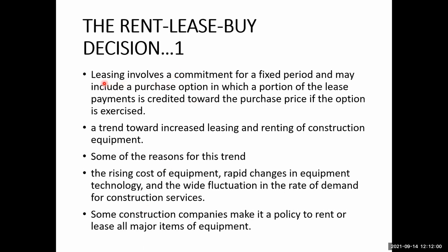Another term which is used is leasing. Leasing is also renting, but the general difference between leasing and renting is that in renting there is normally no fixed period commitment. That means you rent the equipment for 1 week or 1 month or 2 months, like that. And if you don't need that equipment, you can return it at any time. So it is based on a monthly or weekly subscription.